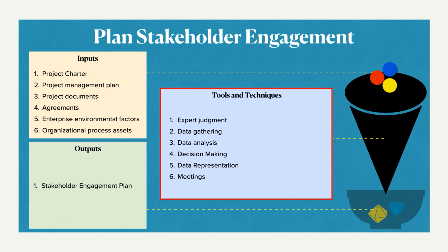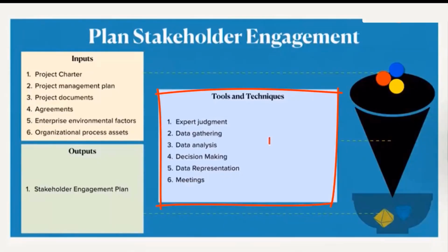What happens in mind mapping is, again, I make use of the pen. We have stakeholder 1, stakeholder 2, stakeholder 3, stakeholder 4, all of them listed. And then we do an engagement assessment matrix. Because we are talking about the engagement of the stakeholder, we categorize the levels of engagement. What levels of engagement are there? For example, if he is not aware of anything that is happening in the project, that means he is least engaged. On the other hand, if the person is actually leading the project, then he has the maximum engagement. So he's self-driven, he's leading the project ahead. So that is the maximum engagement, and minimum is he's not even aware of what is going on.